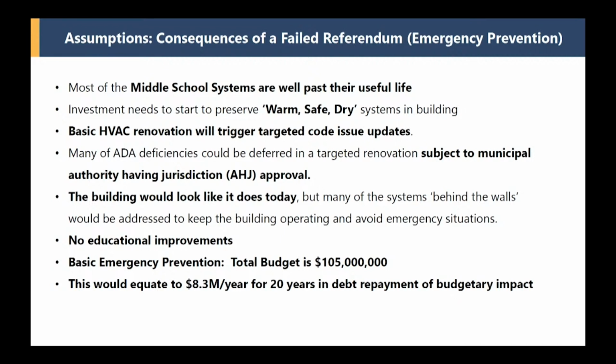Now, what would happen if the referendum failed. As many of you know, at the middle school a lot of the systems are well past their useful life, and it's really time to start investing. You have a good opportunity here to invest in a new building, or you can invest in the existing building. Just the basic HVAC renovation in this building is going to trigger a lot of code upgrades because it's going to be invasive. So that will include some of the HVAC and return air codes, et cetera.